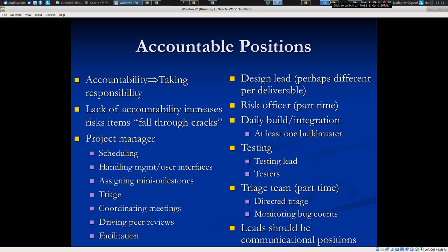You see a lot of statistics out there about failure of software projects historically. You know, 80% of software projects come in over budget and over schedule, or statistics like that. Just be aware that those statistics do reflect the fact that developing good software within the Iron Triangle is hard. But they also reflect often bad judgment about what's an appropriate schedule for this project. Same project, same deliverable, may be judged unsuccessful because it's judged against an unrealistically short schedule expectation imposed on that project.